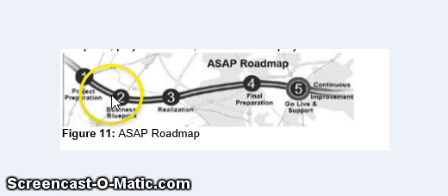The second step in your ASAP roadmap is your business blueprint. In the business blueprint phase, basically what you do is create a blueprint which documents your enterprise's requirements and establishes how your business processes and organizational structure are represented in the SAP system. You also refine the original project goals and objectives and revise the overall project schedule in this phase.